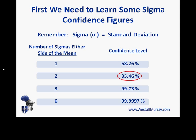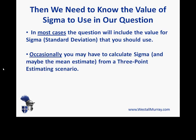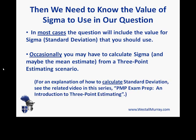In our example we're talking about 95%, and the closest value is two sigma. To answer exam questions you also need to know the actual value of sigma — not just how many sigmas, but what sigma is numerically. In most questions you will be given that value directly. In some cases, however, you might need to calculate sigma, and also the mean estimate, from a three-point estimating scenario. A reminder that there's another video called 'PMP Exam Prep: An Introduction to Three-Point Estimating' to help with that.